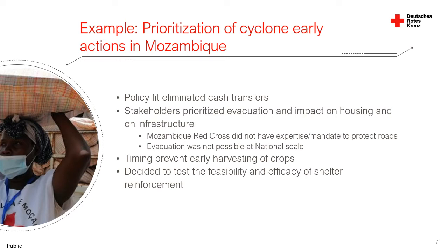The National Society staff consulted with many stakeholders about how to operationalize evacuation assistance. However, there was not an existing network of cyclone shelters in Mozambique at the time, and Mozambique Red Cross eventually decided it would not be able to establish memoranda of understanding with transport providers and take charge of evacuation sites in all vulnerable districts. As this would be needed to activate the protocol wherever impact would be greatest, evacuation assistance was also shelved until further notice.